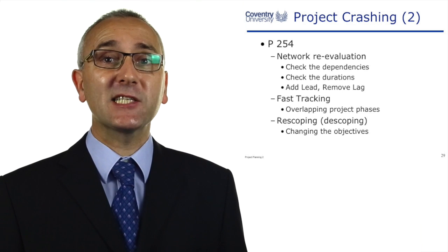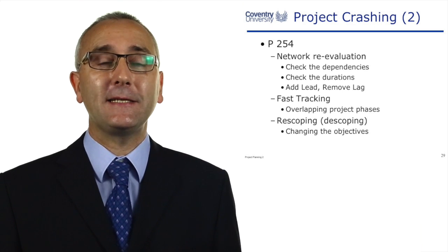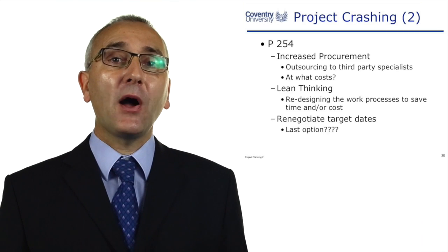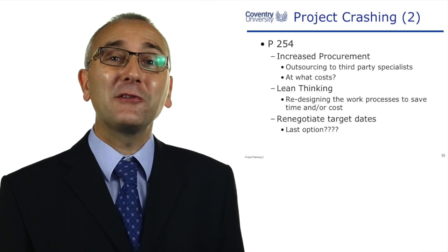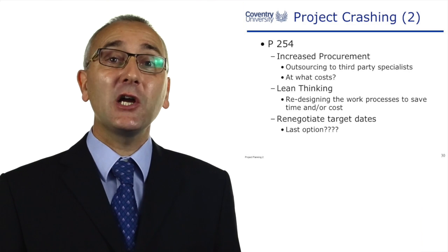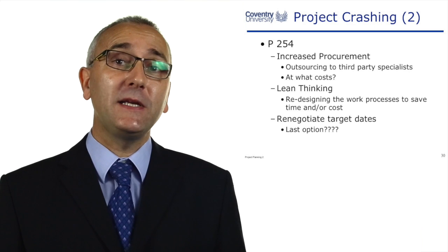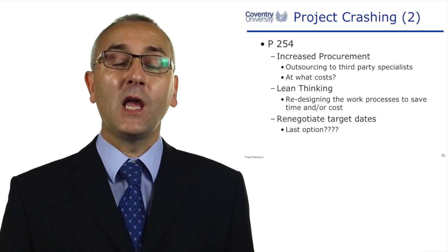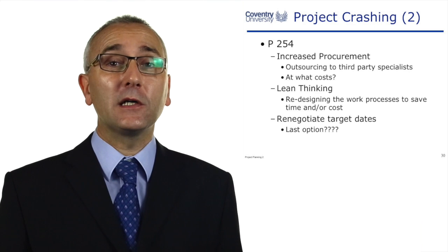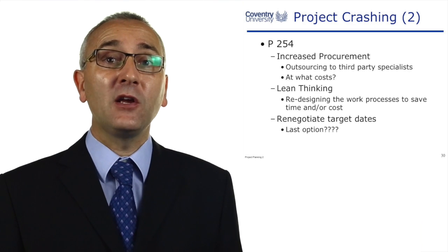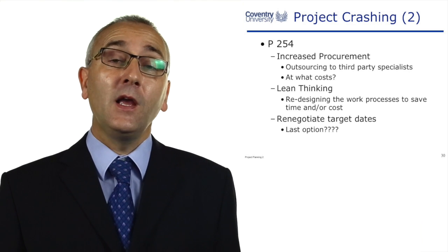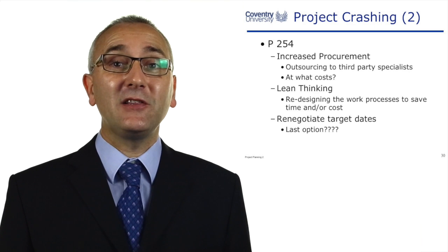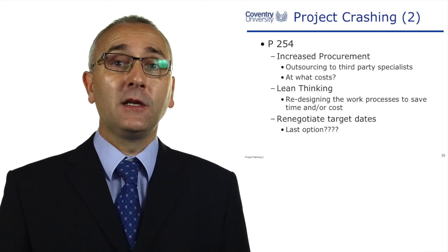Re-scoping means de-scoping the project — removing the functionality. Increased procurement: buying more things, using more contractors, hiring specialist equipment, hiring third-party specialists is a way of outsourcing work which might mean it can be done quicker. Rethinking the work — doing the same task in a new way that takes less time. This is working smarter, not harder. And maybe as the last option, renegotiating the end date for the project if you really can't meet it.